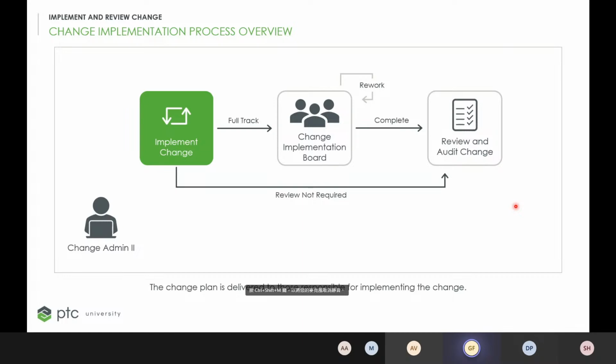The reviewer: if you set a reviewer with the assignee of the task, the reviewer just evaluates the changes the assignee made, just verifies that they're clear and concise. However, the reviewer has the ability, guys, to route back the task to the assignee if he does not agree with it, for further updates.